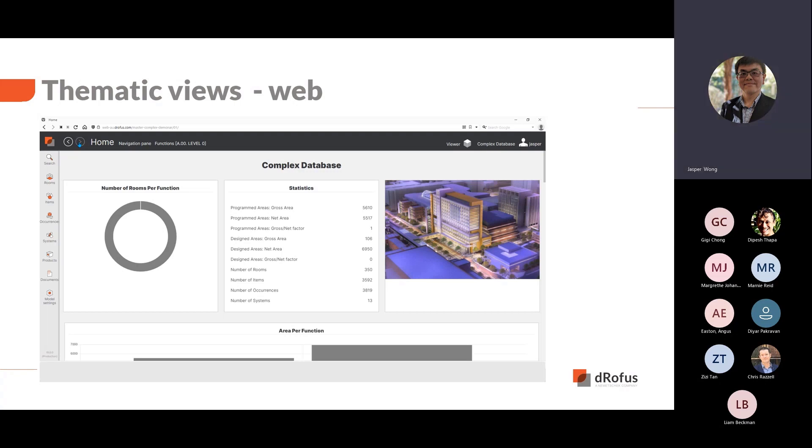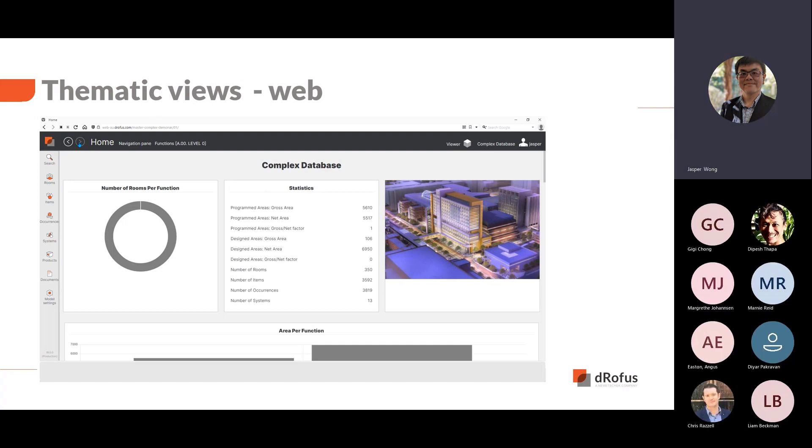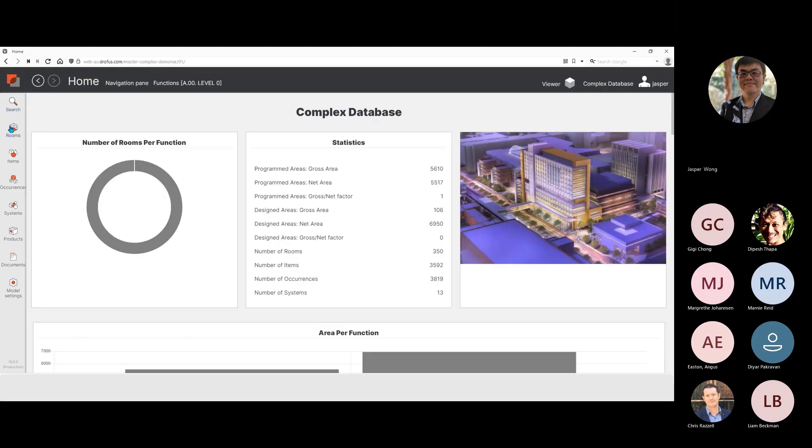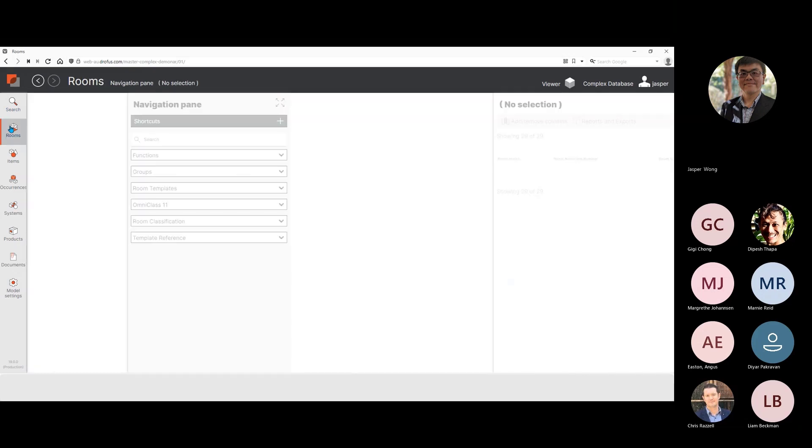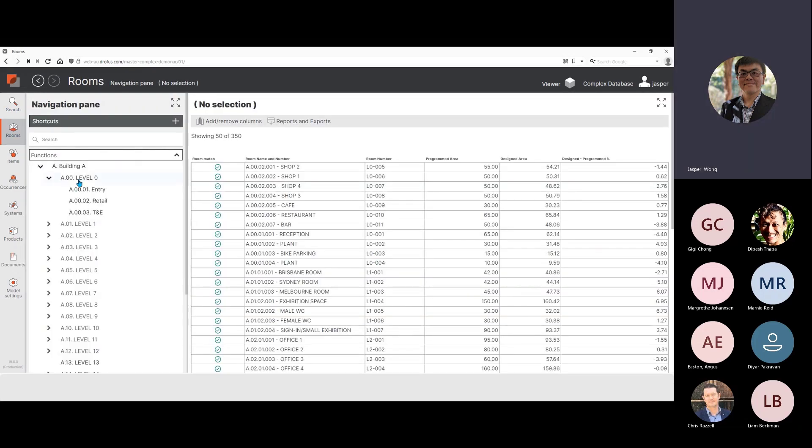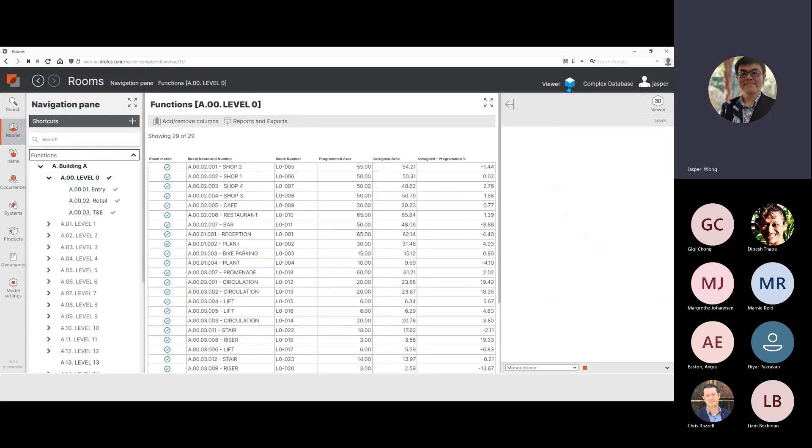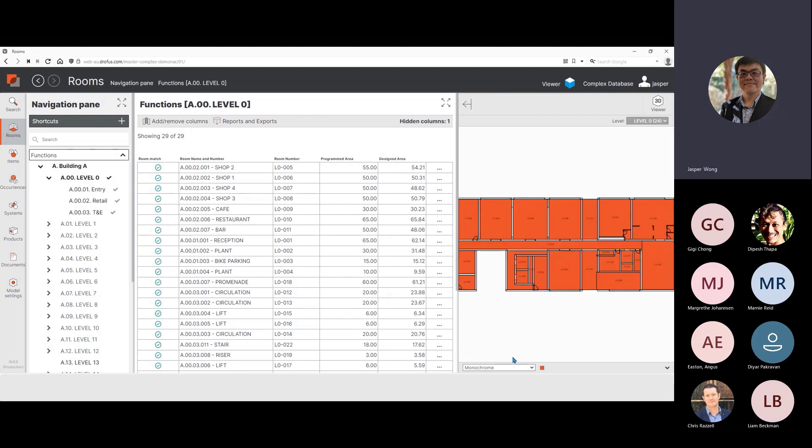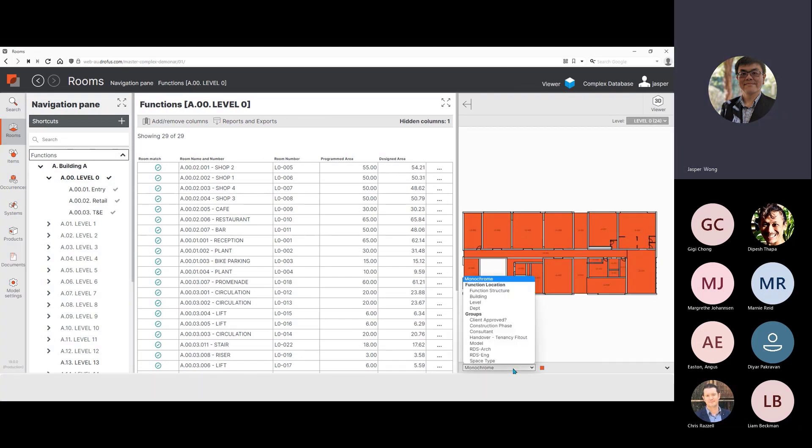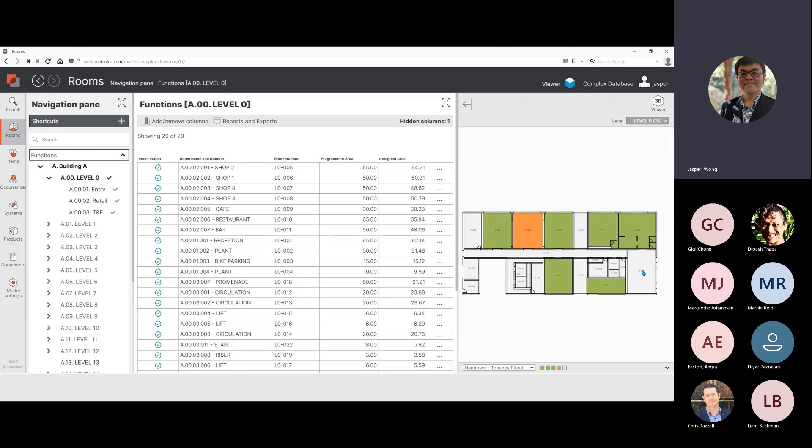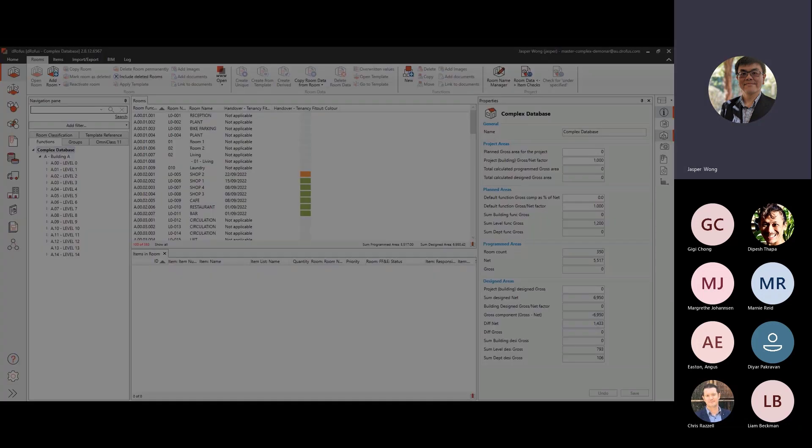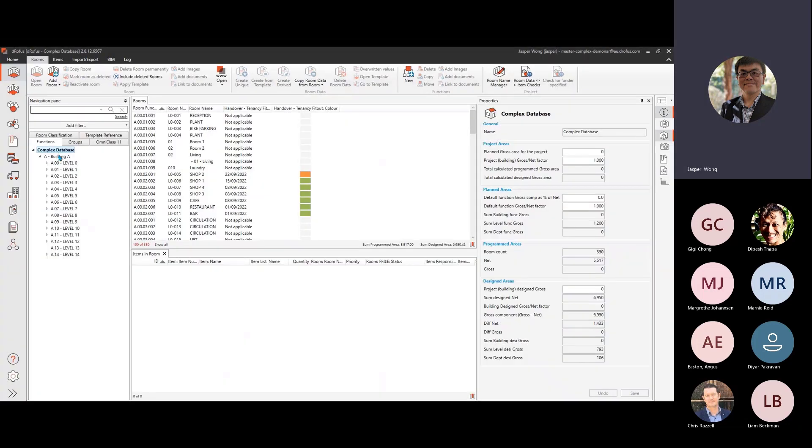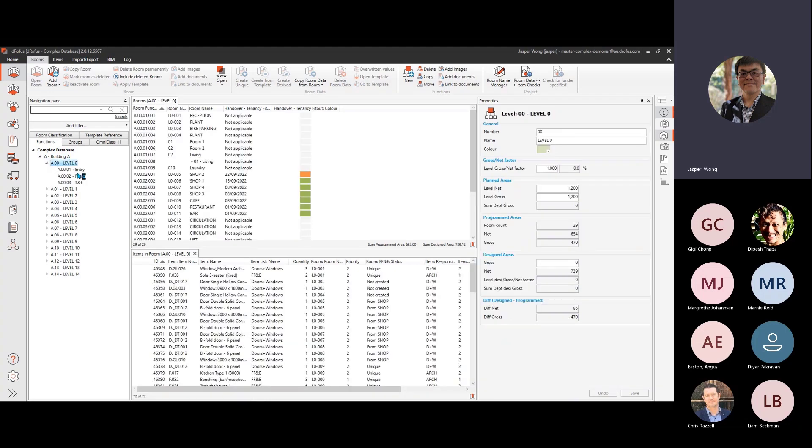On every project, at some point in time, stakeholders would have made a color markup to distill complex information or simply view it graphically, such as handover dates. In this scenario, a contractor has to handover some retail tenancies to different fit-out teams. Within DROFUS, you can set up the handover dates in a group and assign these dates to the shops. This information can be viewed graphically using the IFC model in DROFUS web. Browsing to the tenancies on level zero or ground level, we change the 2D view to display the tenancy handover dates. There are different colors and a legend to distinguish what they are. There are several dates with the same colors and the settings for the colors are managed in the desktop client.